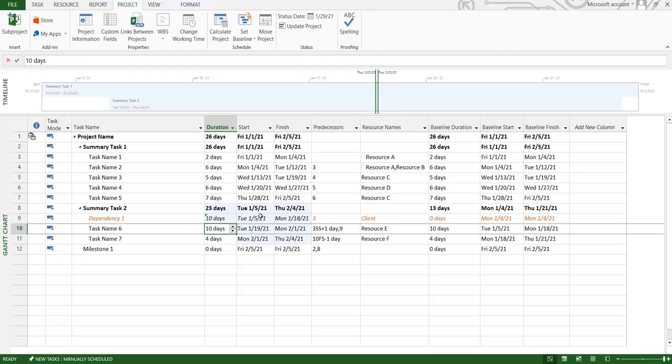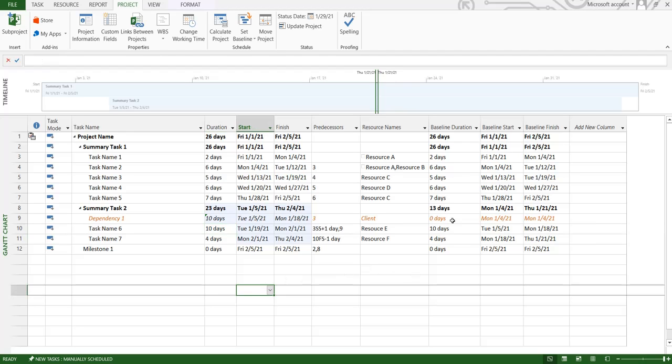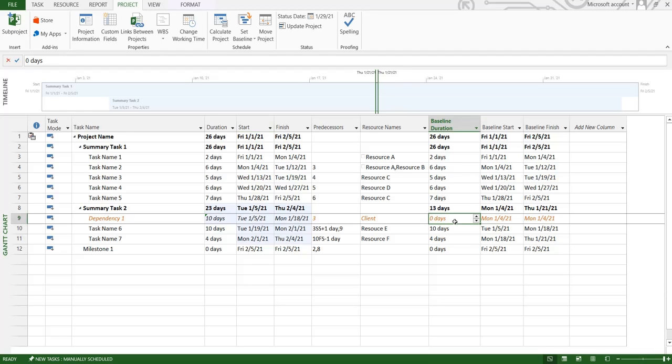So immediately my project dates or tasks that are dependent on that dependency move forward to a certain date. Now you can see over here that the dates and duration remain the same. So basically, when you're running a report in future, you can identify the variance in tasks. For example, some tasks will be working as planned, where actual dates and baseline dates will be the same. However, some tasks will have some lags in place.